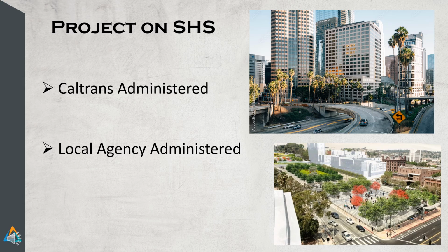In these cases, Caltrans administers those projects. For example, LA Metro wants to do an HOV lane project on I-5, and they're going to use their funds for this project, so it's a local agency project, but because it's on I-5 they want Caltrans to do it, so they might subvent the funds, which means they give us the money for the project and Caltrans administers the project.